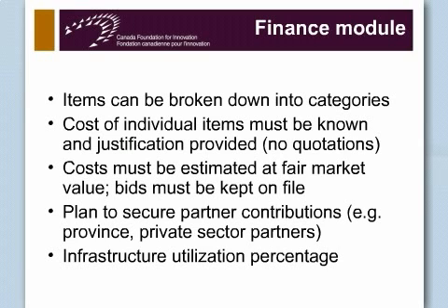But we would like you to be reasonable in the amount of cushioning you put on those numbers, something around 5%. And if you know you're going to buy something from the United States, you can estimate brokerage fees and customs to cover this purchase. So that could be added to your final price.